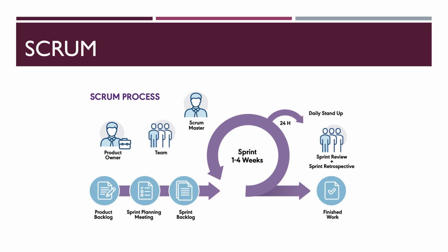A Scrum team boosts collaboration and discusses progress during daily stand-up meetings, and they use a Scrum board to maintain and monitor their project. There are 5 phases. The first phase is product backlog creation, the second phase is sprint planning, the third phase is working on the sprint, the fourth phase is testing and demonstrating, and the fifth and last phase is retrospective.